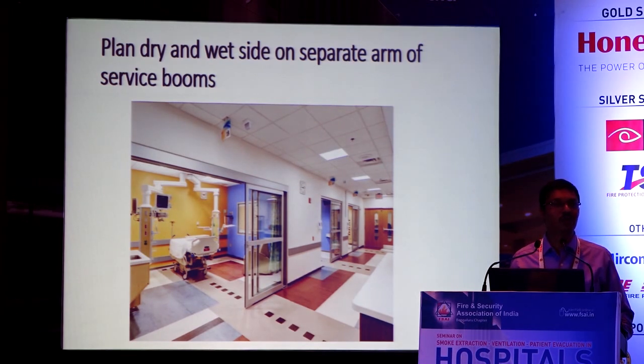This is something which can be thought of when you are planning for the medical equipment, at the planning stage, when you are commissioning any hospital. Later on, it's very, very difficult because you have to move, and all the services are coming. The services are medical gases, electrical, and the IT lines. So it's better that we plan in advance so that we are safe from the infrastructure per se.